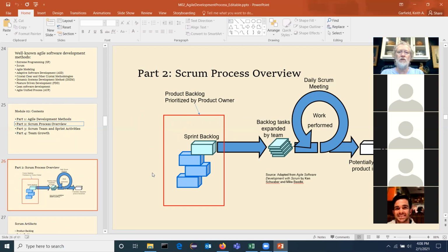And then from there, you can create itemized backlog items, which are often in the form of what are called user stories. I want the product to do this. I want the product to do that. And sometimes you have user stories like, we need to make a schedule, or we need to do some other task before we can start. So that's why sometimes the first sprint is not getting that software product out the door. It's like a pre-sprint sprint. And that's what I'm asking you to try to get done during your team formation week, your product definition week, prior to the sprint starting.